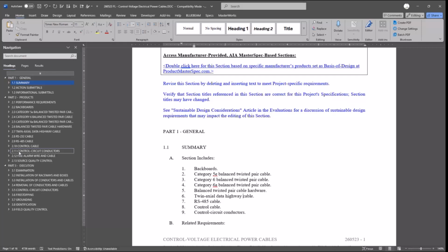But just make sure everything's going through the proper channels. I put that in air quotes that you can't see, because emails are one thing, but whenever it's all laid out, the client can see, the contractor can see, you can see, the CA on all three sides can see. There's a reason Newforma and eBuilder exist, and it's so that everybody can see exactly what's going on, the status, responses. And it's not, oh well, I sent so and so an email. Great. Did anybody CC anybody else? No. Well, nobody else has that email. Well, sorry, kind of out of luck on that one.